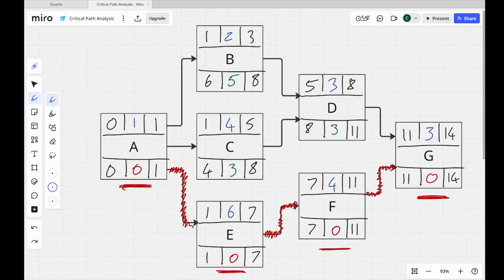So total float is the amount of wiggle room a task has on it before it affects the end date. The critical path is the tasks with 0 total float, or the least total float technically, which is 0 in this project's case. It should be if you've done it properly, incidentally. And that tells me those tasks are the ones with the greatest risk to the timeline. If any of those tasks are late, the project will be late. So that's showing me where the greatest risk is, if we're talking about timeline risk anyway.